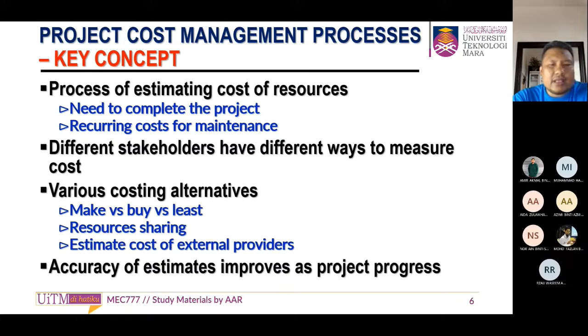Estimate cost of external providers. This is the tender process, where we try to find the best price and who can do a similar job at a lower price. That's why we estimate the cost of external providers, and the accuracy of estimates improves as the project progresses.